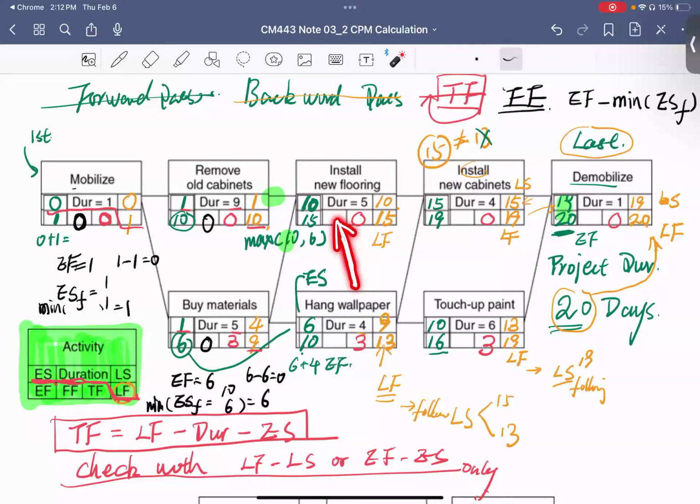Are you getting this number here for the free fruit? Will that also be 0, or am I wrong? That will be... early start time is 15. Early finish time is 15. So it's 0. Okay. You're getting this, yes? Okay, cool. Next one, this.